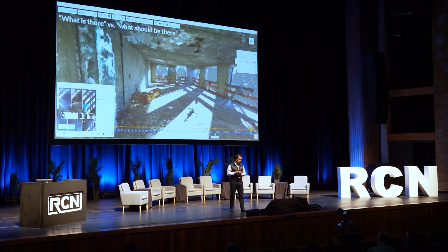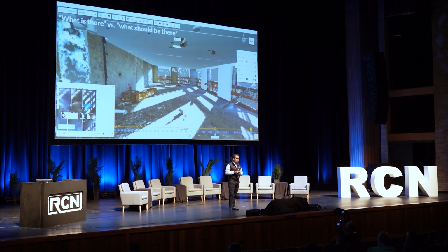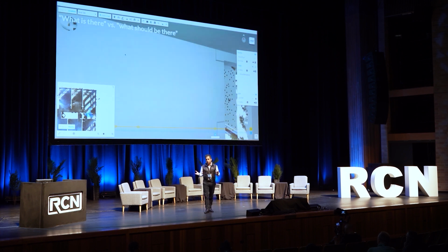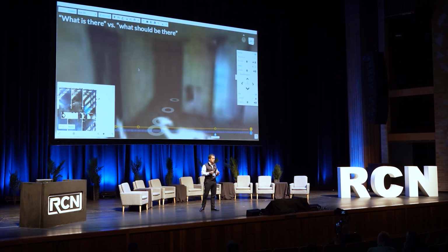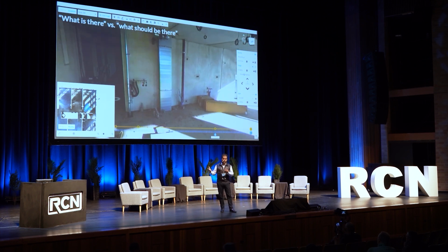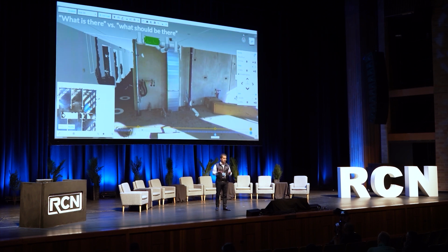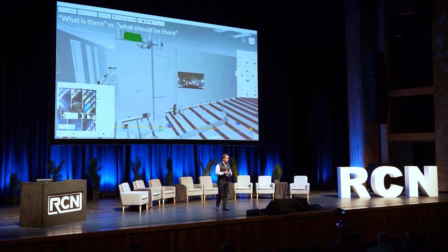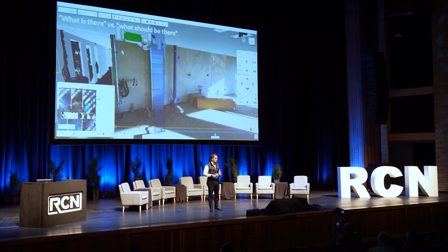Now let's go back to the 3D environment, and let's see if we can overlay the BIM model. Now, on most of the job sites that we're engaged in, MEP coordination is evolving during the construction phase, as it should, especially in early phases. So the idea here is that by tapping into your common data environment, the same design can be overlaid against the reality. From any given camera viewpoint, you can actually see the design not just side by side, but as an overlay. Why? Because your data is measurable, and because there's a point cloud sitting in the back that you can use as a basis of alignment between the reality and the design.